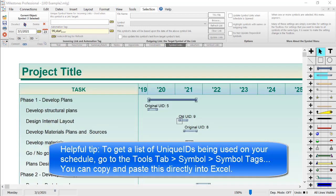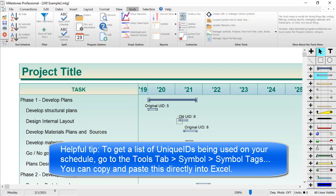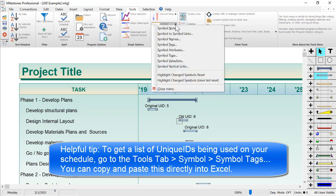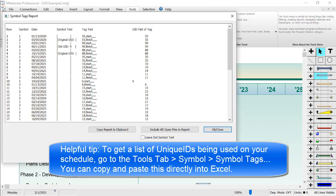Another helpful tip is a way to see a list of all unique IDs being used in your Milestones Professional schedule. If you go to the Tools tab and click on the Symbol button, and then choose Symbol Tags, it will show you a list of all the symbol tags on your schedule, including a separate column for unique IDs. You can actually copy and paste this list directly into Excel, so you've already got your old unique ID column set up.